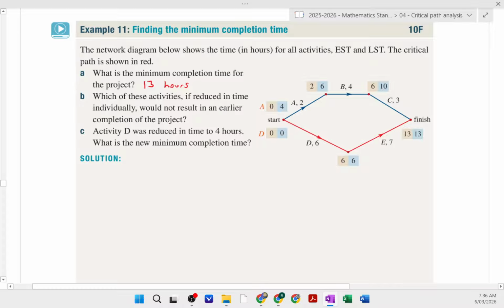So if you have a look, if we reduced the time of that one, that would obviously affect this. Same as if we reduced the time of that. So if that wasn't 7, like if it was 5, then this would obviously become 11. So that could affect it. However, if we reduced that to, say, 1 day, then you'd end up with 7 and 9. But that doesn't affect this.